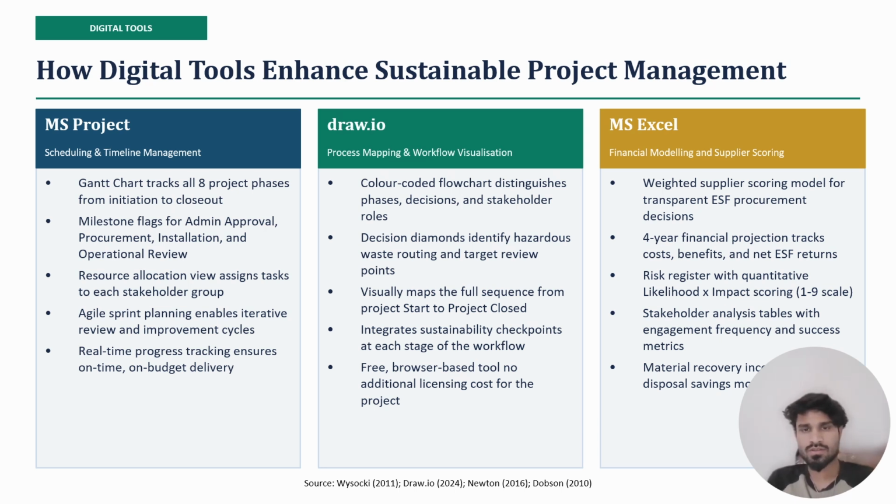I use three digital tools selected critically for the special purpose rather than chosen randomly. MS Project manages scheduling, processing all the 36 tasks from the project kickoff on December 10, 2025 to closure in June 2026, with milestone flags ensuring the phases are completed before the process proceeds, and